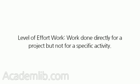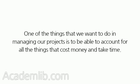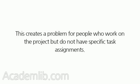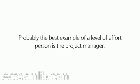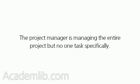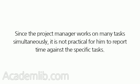Level of effort work: work done directly for a project but not for a specific activity. In managing projects, we want to account for all things that cost money and take time. This creates a problem for people who work on the project but do not have specific task assignments. The best example of a level of effort person is the project manager, who manages the entire project but no one task specifically. Since the project manager works on many tasks simultaneously, it is not practical to report time against specific tasks — time is just charged against the project.